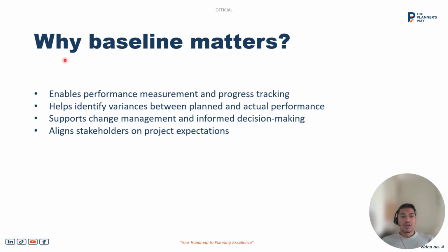Then why it matters, why everyone is so conscious of the baseline, why we need to make a baseline at the start of the project. The benefit of having a baseline is it enables project performance and progress tracking. That means at any point, midway or after 2 months of commencing the project, we can track where we are. We can identify the variance using variance analysis techniques, comparing plan and actual. We can compare whether we are on track, behind or ahead of schedule, against the baseline.